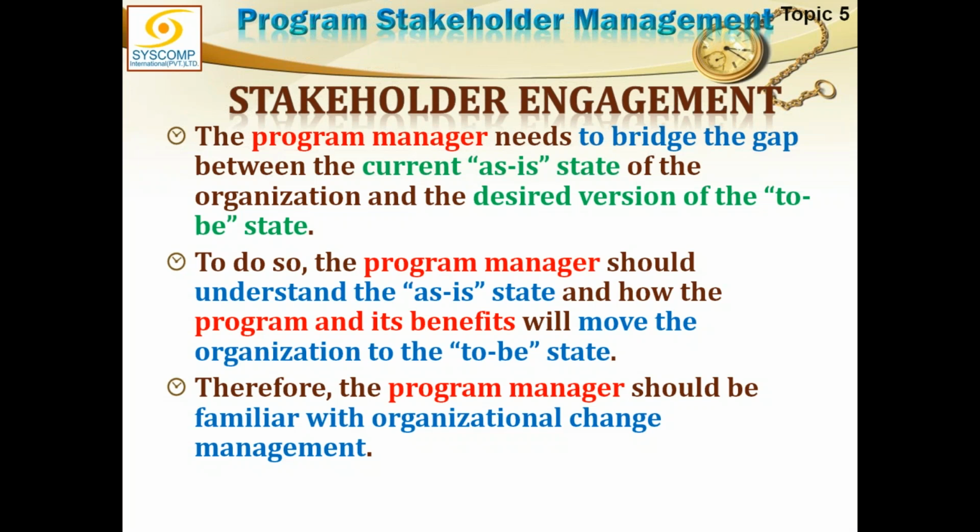And we talked about benefits. We said all the benefits may not be measurable, right? Correct. So we have to take certain measures to make the unmeasurable measurable. To convert an unmeasurable thing into a measurable thing, we probably need to use some kind of a Likert scale and some kind of a general understanding that this is what it means. So we will be looking at that.